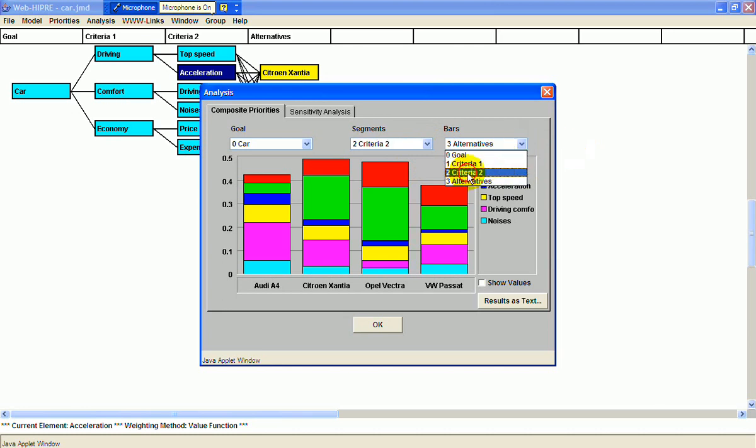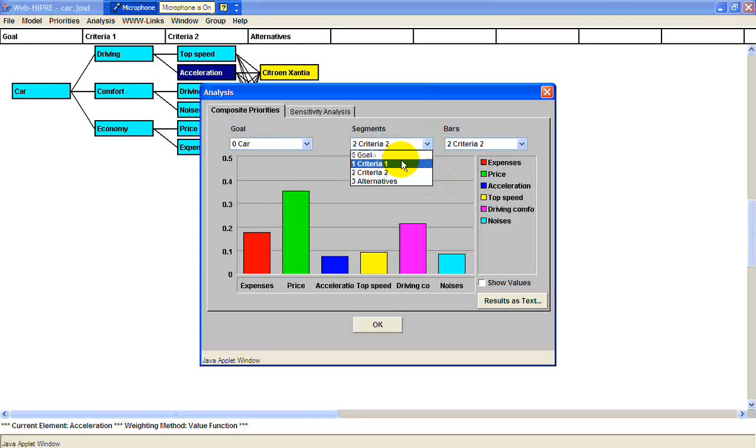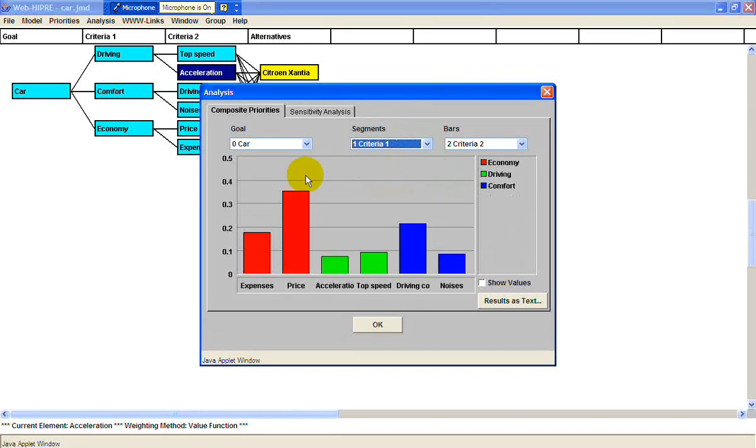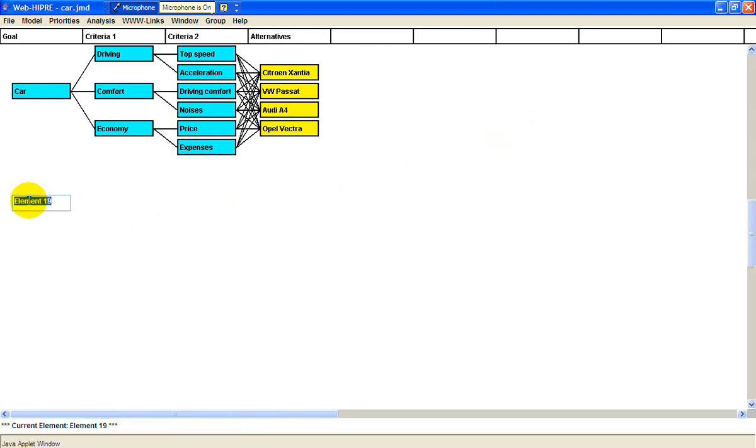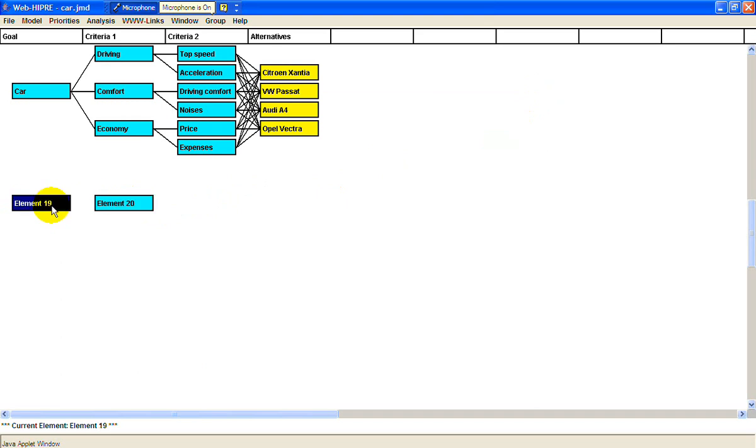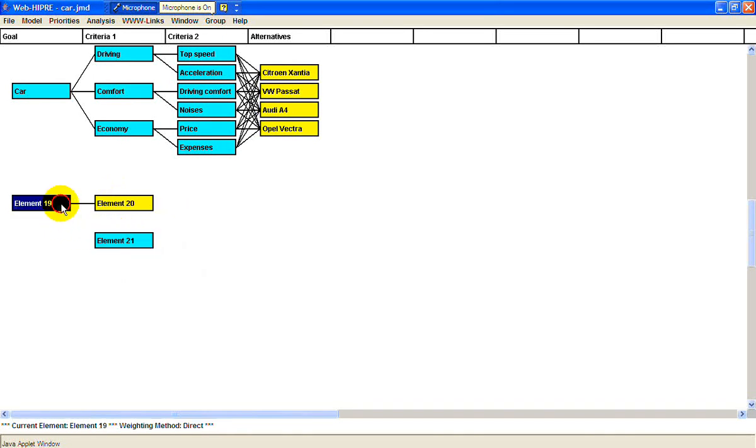Now, when you're setting this up, just double-click and you'll get an element. Double-click again and you'll get a second element. When you want to connect these, you left-click on one, right-click on the other, and it makes the connection. This is a pretty easy way to set up your network diagram. You can use this for one of your homework problems. Good luck.